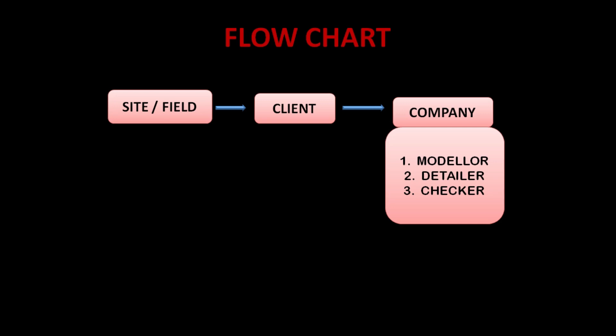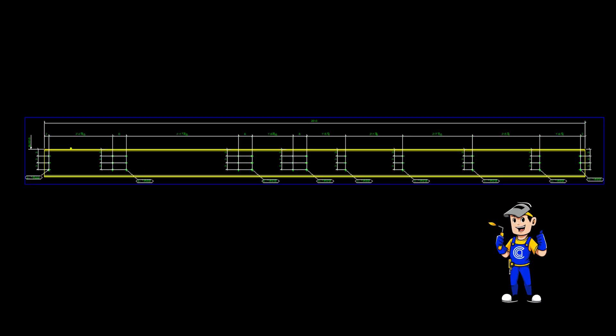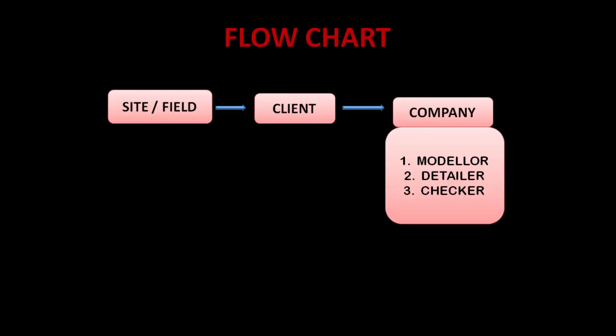The modeler's work is to create a 3D model by using the design drawings given by the client. After creating the model, the detailer has to create 2D drawings of the same model. If you give a 3D model directly to the fabricator, he cannot fabricate it because he won't know the proper lengths, bolt distances, and edge distances. The detailer creates 2D drawings providing all those details — length of the beam, edge distances, bolt distances — so the fabricator can understand.